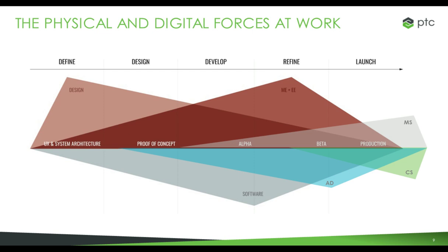Also, we've learned to start bringing in the call center or customer services earlier as well, because they can start grabbing the questions and the Q&A and the problems and start coming up with the resolutions and really start building the knowledge base that we can use for our customer support, for self-help, or to very quickly answer questions. So when the customer launches to production, they have all that information already there, and we can transition that information over to our customers if they want to use their call center, or if they want to integrate with ours, they can have access to that through our call center as well.